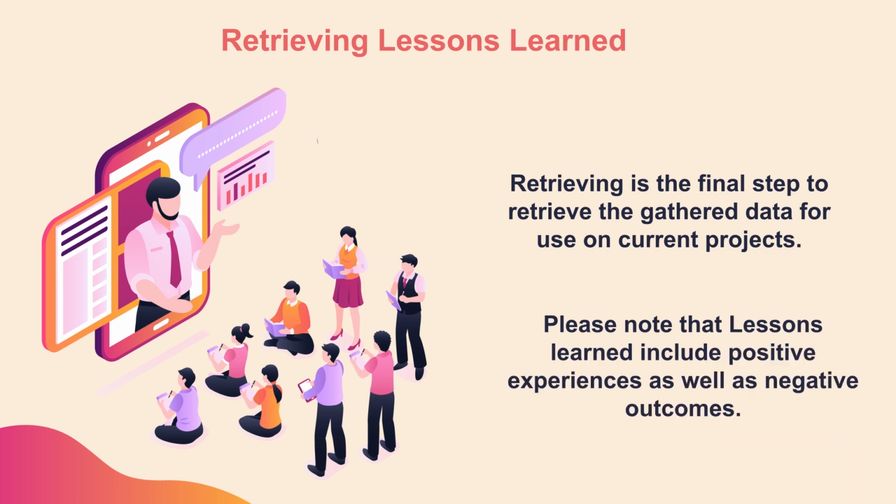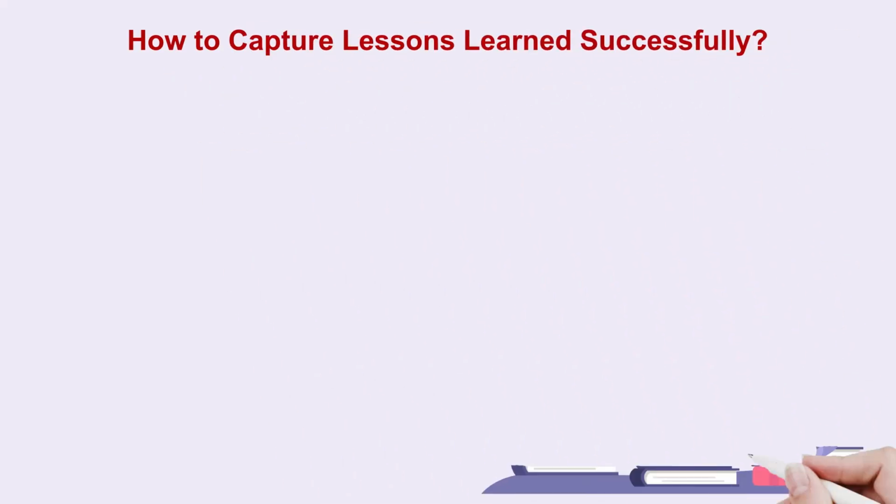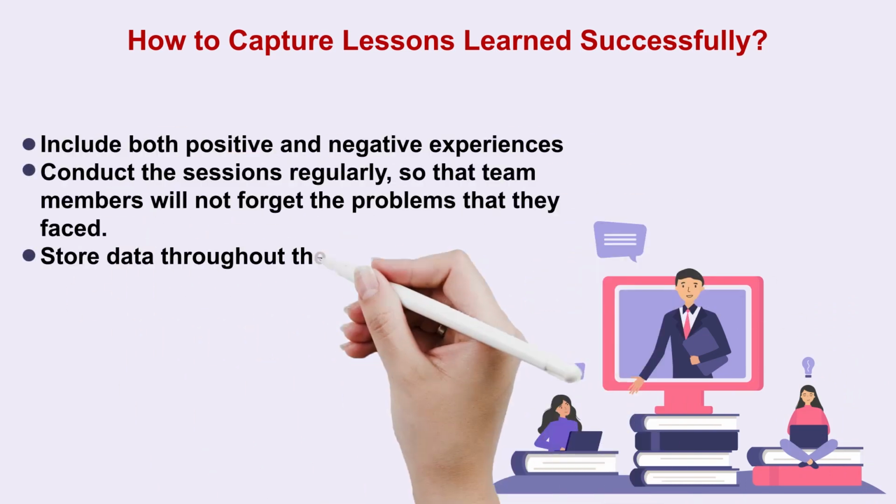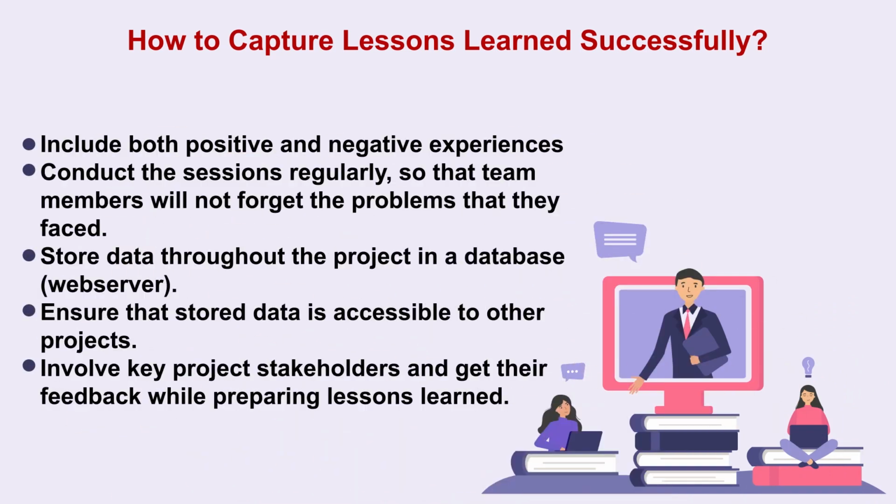Please note that lessons learned include positive experiences as well as negative outcomes. How to capture lessons learned successfully. Include both positive and negative experiences. Conduct the sessions regularly, so that team members will not forget the problems that they faced. Store data throughout the project in a database. Ensure that stored data is accessible to other projects. Involve key project stakeholders and get their feedback while preparing lessons learned.